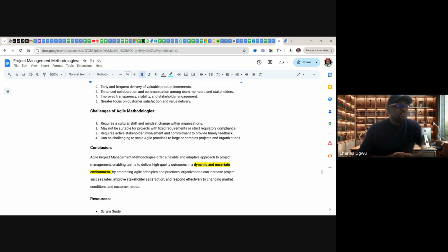You see so many of them having daily stand-up once every week, and they will tell you that they are working in an agile environment. If you are working in an agile environment, you must have daily stand-up every day. You must observe 15 minutes. I've seen some teams claiming they are agile. They have daily stand-up every day, but it lasts for 1 hour. So if you are going to work in agile, you must observe it strictly. These are so many challenges we're having.